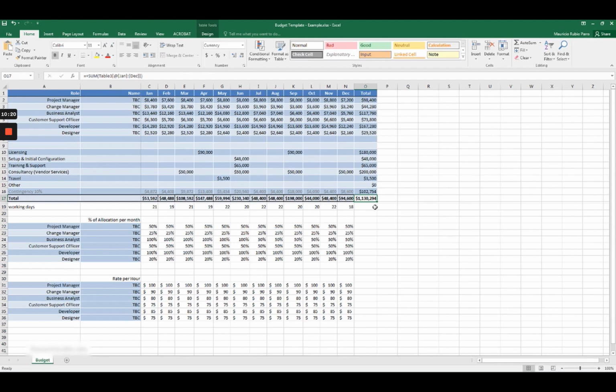And if you're going through discussions and, for example, you send this to your manager and he says, no, I don't want you to put 10% in contingency, then you need to change this number from 10 to 5 because he asked you to reduce the contingency. Well, you just reduce it and then just save this file as version 2, right? So you keep history and you keep track of what you're changing in the budget. And that's just for you more as a PM to reference and go back to if you need to. I think that's pretty much it.